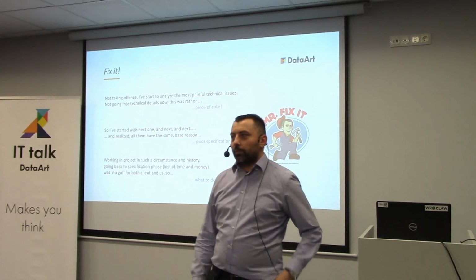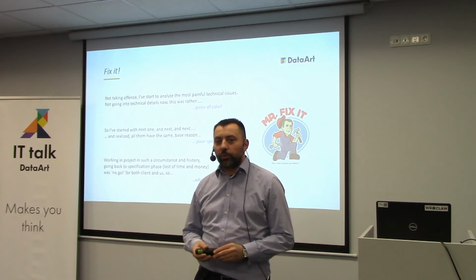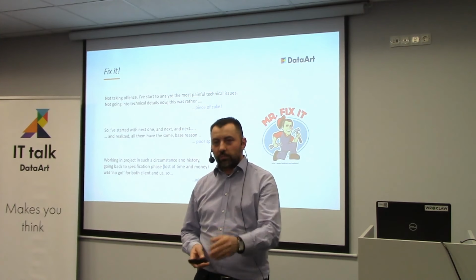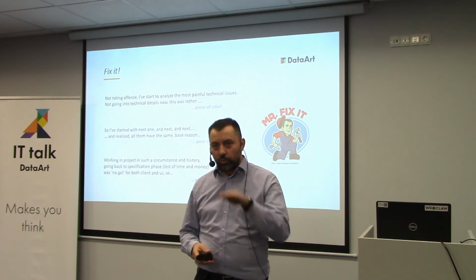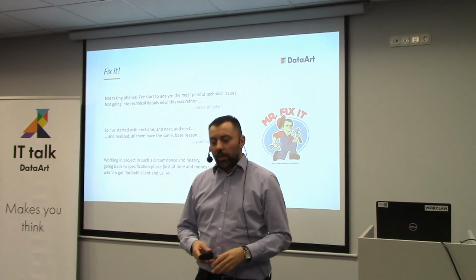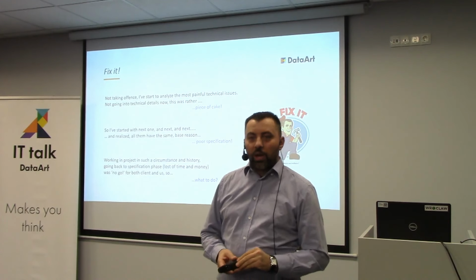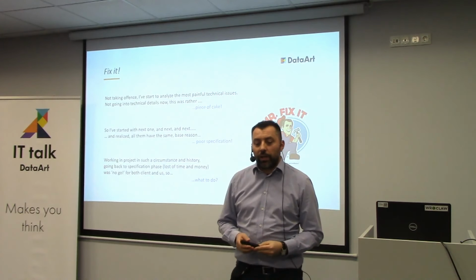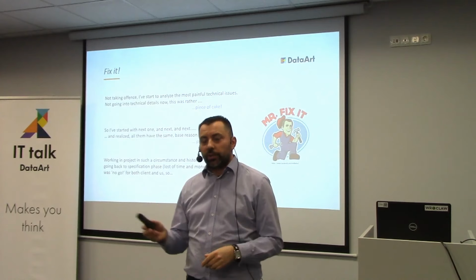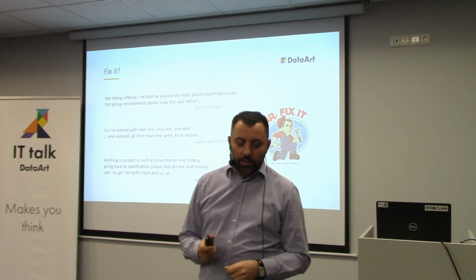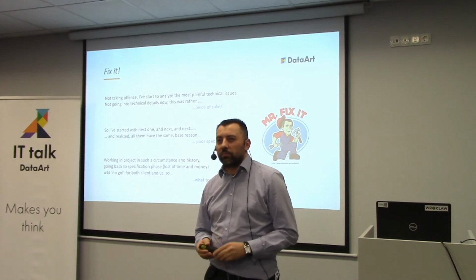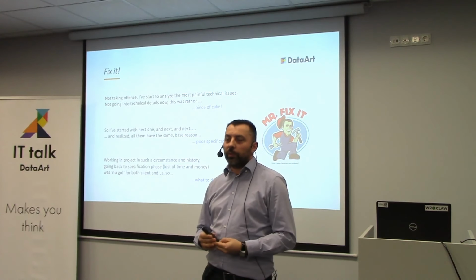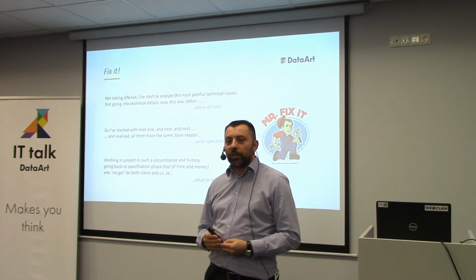Usually in a classical agile project, you need to do it at the beginning. You say, this is my definition of done for that kind of artifact, and you need to provide it to keep good quality. There are also acceptance criteria, and beside the definition of done, you need to define the definition of ready, when it's ready. In my personal opinion, the sooner you do it, the better.